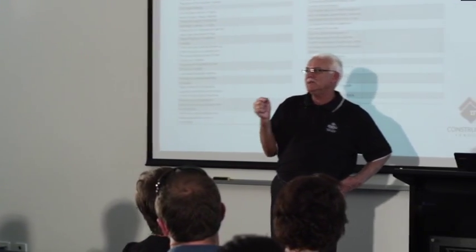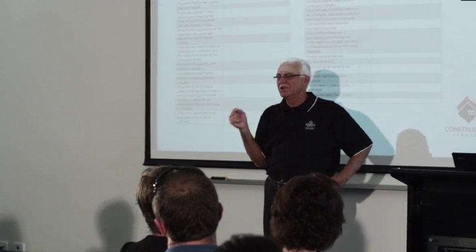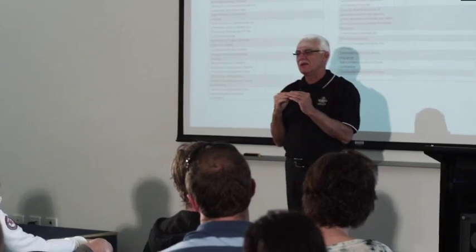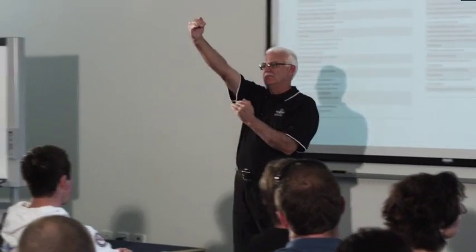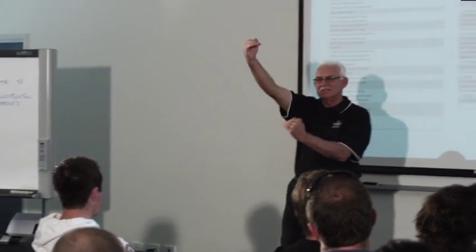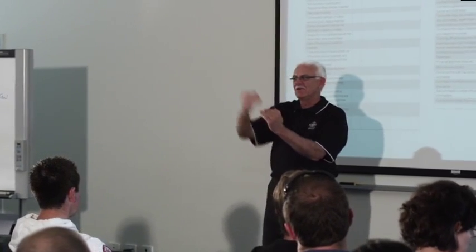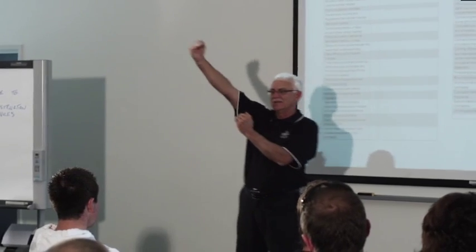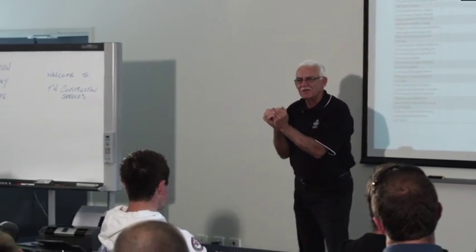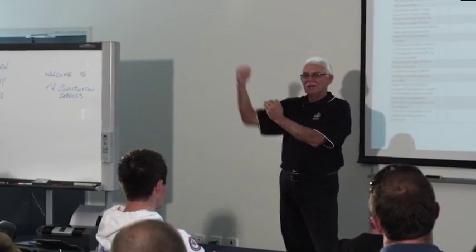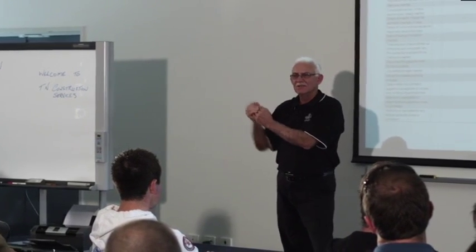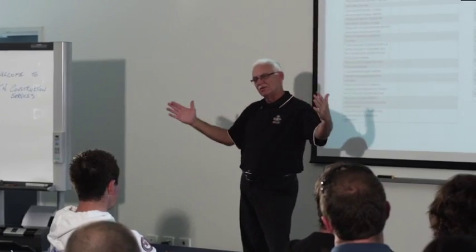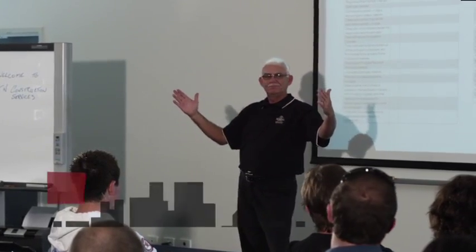Your contract is per working day. Right, so when you work out your contract period, you'll work out that it might take you 60 days to build a house, but then you've got 5 lots of weekends in there, so there's another 10 days. Then there's another 5 holidays in there, so there's another 5 days. Right, then you might add on a couple of weeks holiday, so there's another 10 days. So that's how you build your contract period up.